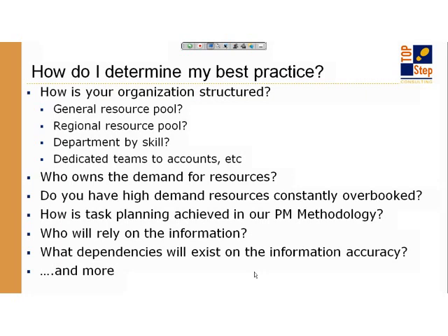How dynamic are your projects? Are your projects one-day activities? Do you need a resource management activity then? If it's just one day, project managers are probably the best to do it. If you have 2.5-year projects, maybe central management is better, because you're wanting to grab people for longer periods of time. Okay. So you can see, and I put the and more.